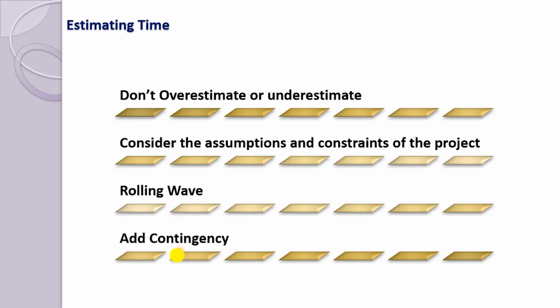When you are breaking deliverables into milestones and estimating how long it will take to deliver them, it's normal to assume that everyone will be working full time. When someone asks us how long something will take, we naturally assume that we are focusing on this alone. Reality could be something different. I'm sure in IT projects it happens daily that you are working on one thing, but because of resource constraints, the priorities keep changing, so one resource may be assigned multiple tasks.